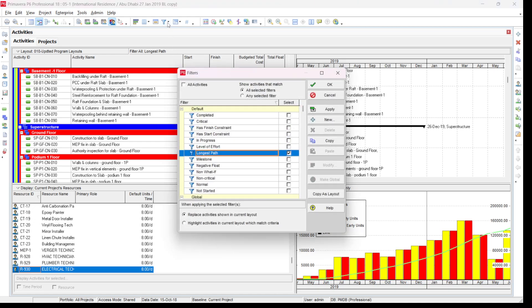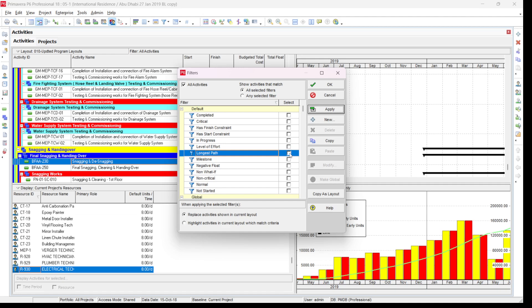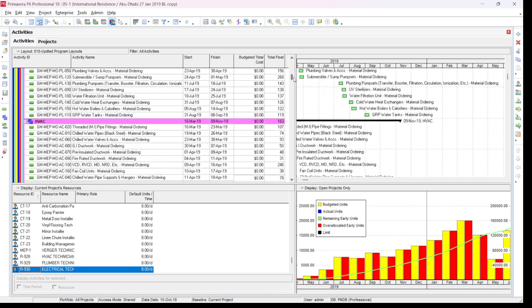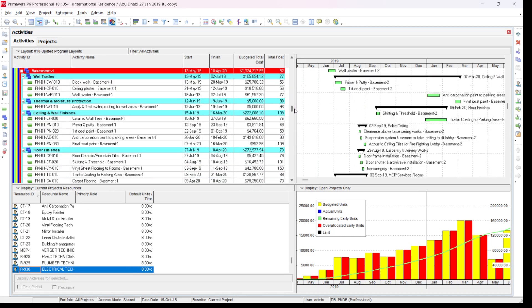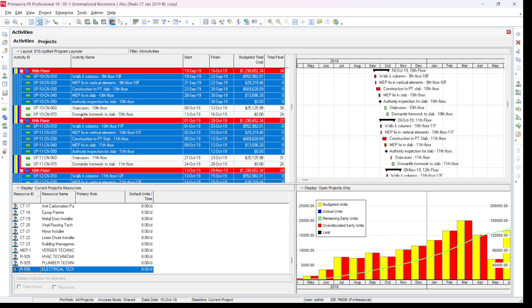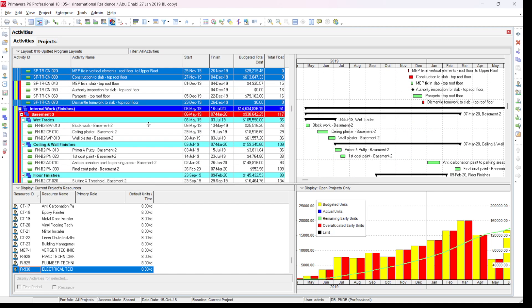If you want to highlight only the activities rather than replace the view, click on 'All Activities' again, apply, then click 'Longest Path' again. At the bottom there are two options when applying the selected filter: 'Replace the activities shown in the current layout' or 'Highlight activities in the current layout which match the criteria'. For example, to just highlight, click 'Highlight' and then 'Apply' — it will highlight all the activities meeting our criteria. You can see that, for example, the column and structure is on the critical path but the staircases and dismantling of the formwork are not.